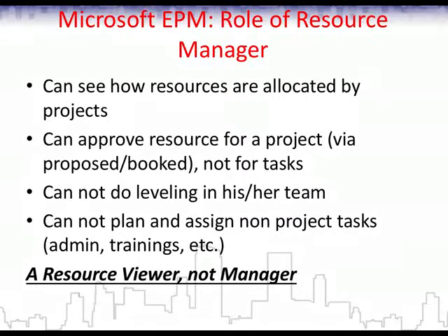Since he can only see the workload of his team across projects with resource assignments, reports in Resource Center, or other reports with Reporting Services or Excel Services, he cannot do anything with the workload. He cannot do leveling. He cannot replace one person with another if someone gets sick, and so on.